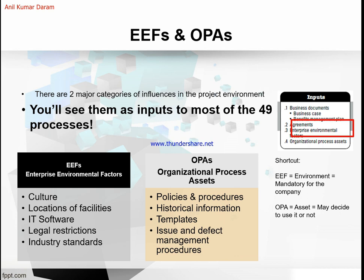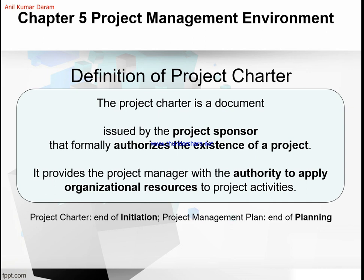After that, we'll move to what a project charter is. The project charter is the initial document for every project. It is a document issued by the project sponsor that formally authorizes the existence of a project. Once the project charter is created, the project manager has the authority to apply organizational resources to the project activities. You will come across the project charter in the next slides. The project charter is not the project management plan, remember this, which describes how the project will be executed, monitored and controlled. It typically marks the end of initiation. Once the initiation phase is completed, your project charter is ready.